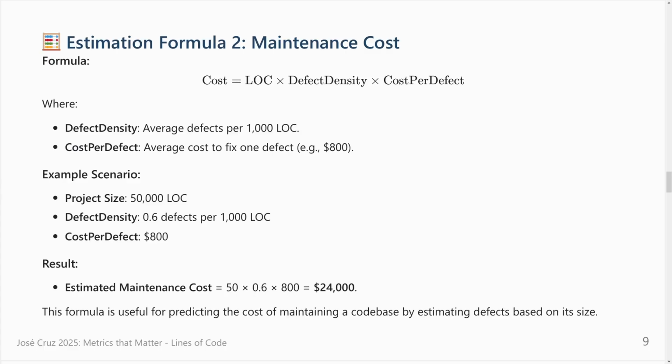And they hired me, and probably someone did this type of cost calculation. The cost per defect will be the hours they expect me to take to fix the defect, times my hourly rate, and you can use that to say how much it costs to fix all these things, how many people do I have, and you can have a budget for fixing your application.